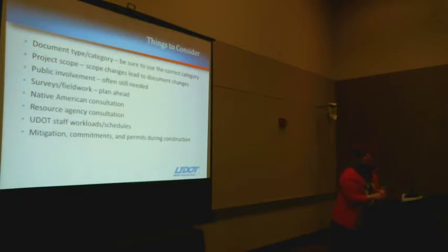Even though CE documents tend to be pretty simple, pretty quick, they still might need public involvement, maybe a public hearing depending on the project. You might still need surveys, agency consultation, Native American consultation, and all of that can add time to your schedule.